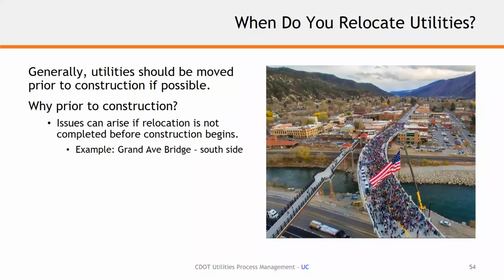But the point of this is, with an early relocation that we pursued with the gas company, they needed a long enough lead time to relocate the gas lines in the downtown area that are in the streets in order to arrange them in a configuration so that they could tie into the phase one pedestrian bridge construction.